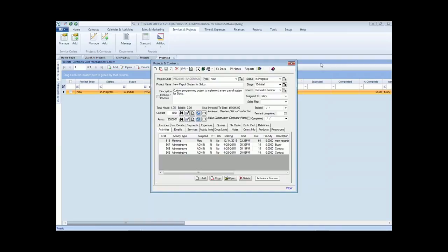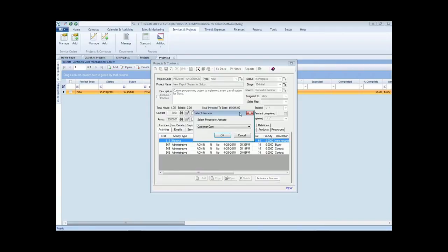But typically, when you're dealing with projects, so for example, this is an installation of an HVAC unit, there really is typically a pretty standard, multiple-step way to do that, from getting a county certificate that lets you do any digging that might be necessary, to bringing in the units, installing the units, configuring them properly, and making sure they're operational. So instead of having to add each of those individual steps and potentially take the risk of skipping one, you're able to handle what's called a process.